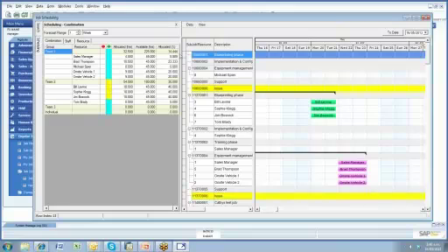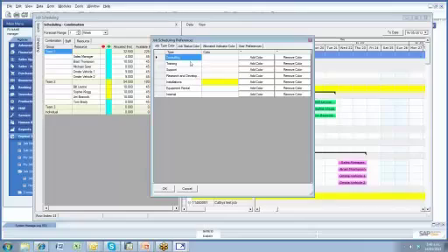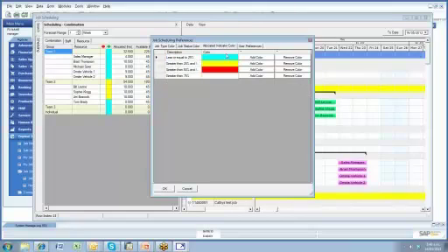There's some color coding here, so we have all sorts of setups where you can say, here we go, the allocated indicator. So the green here means they're allocated for less than 25% of their time. Yellow, between 25–50%, that kind of thing. You'll also notice there's colors all over the place here.